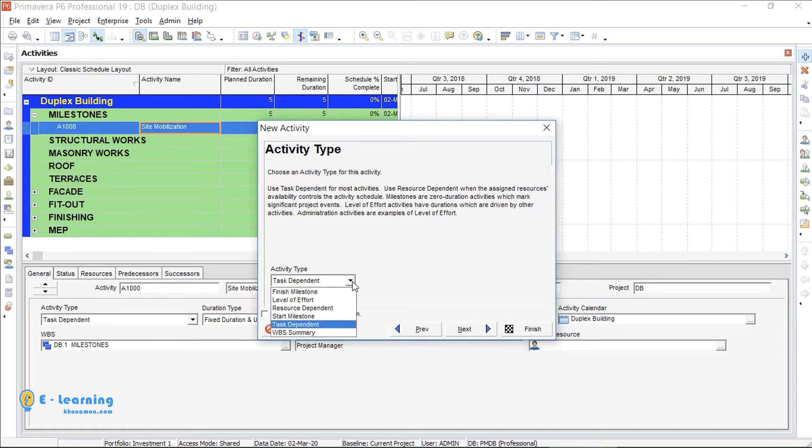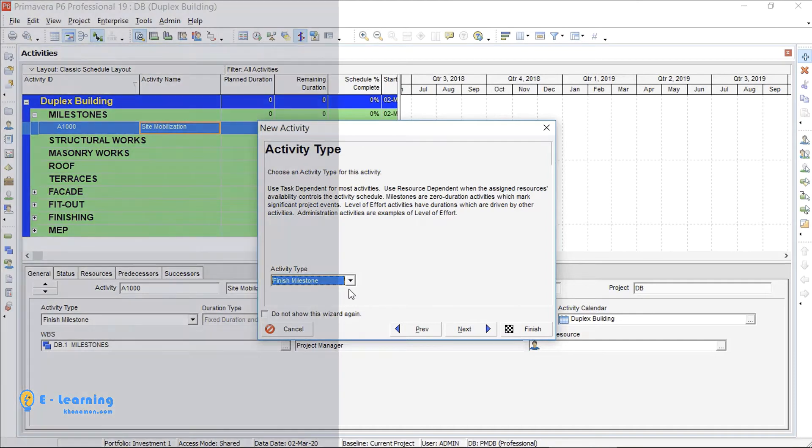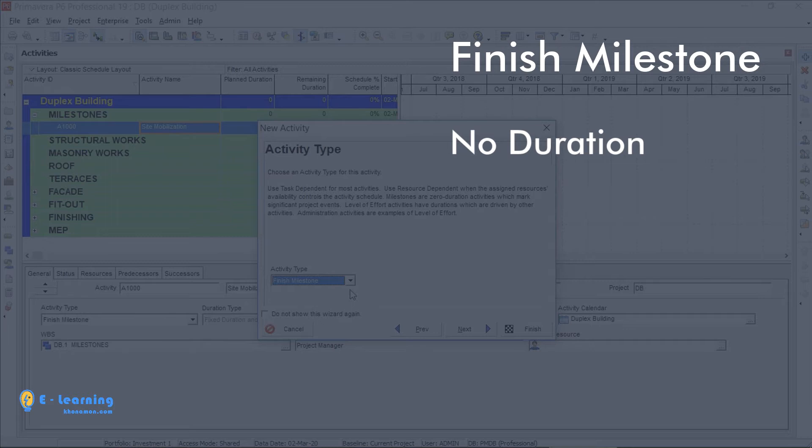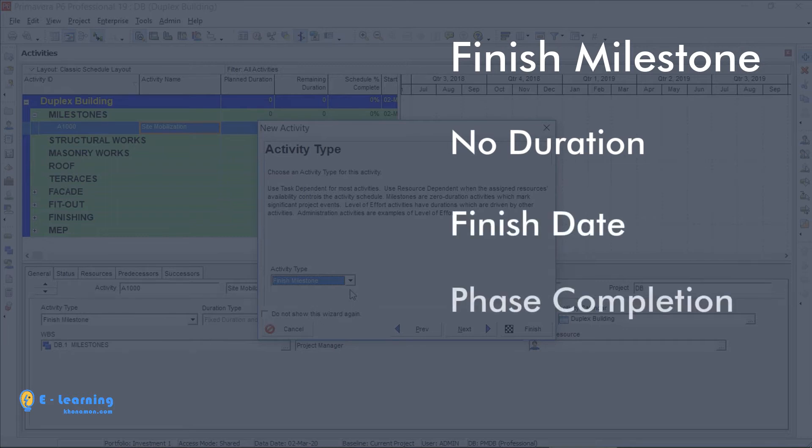We have six activity types in P6. The first one is Finish Milestone. You know, it is a milestone without duration but just has a Finish Day. For indicating the completion of a phase, we use Finish Milestone.